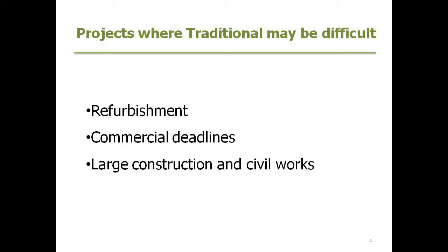And those time issues are very important, because there are a lot of holding costs, the costs that need to be paid in financing before there's actual retail income. And it's not always retail. The long lead time in designing and documenting can often exacerbate the problem. So if they're large scale infrastructure projects, that can actually be further exacerbated by traffic congestion getting worse. Or if we look at the extreme situation, even people continually being turned away from a hospital and those numbers actually increasing. So that's where traditional often doesn't work as well as it could.